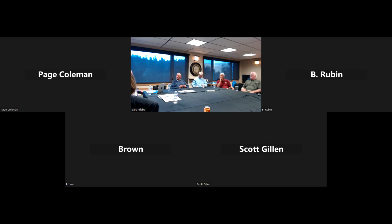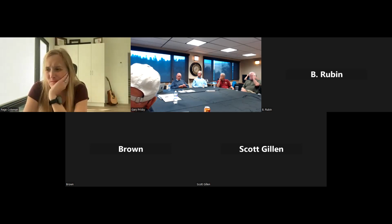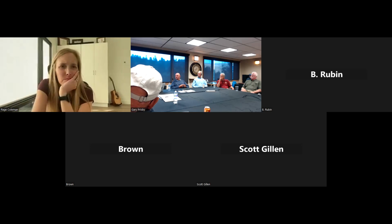We could do that Thursday, and I talked to Mark about it. I hope choosing the option is going to be relatively easy, but John, if you could help me: we have to accept a bid, and then we have to choose the option, correct? Yes. If we have a multi-option bid, then we accept the bid, and that's the easy part. Then you choose the option, but I think that's simultaneous. Pending contractual negotiation is something we can talk about in executive session, but we will have to come out of that session and take a formal action.